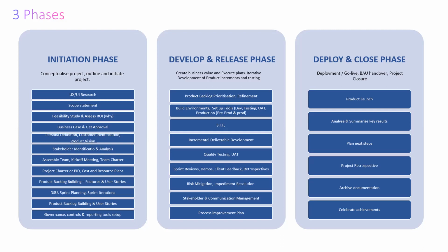Now, I've explained the difference between business case and project charter to some of you. I'm not sure if all of you were on the call on that day. You might need to go and listen to the video again, but I've explained that project charter is specific to your project. When we talk of business case, it stands for the program, because the entire program needs to have a justification for carrying out that program.